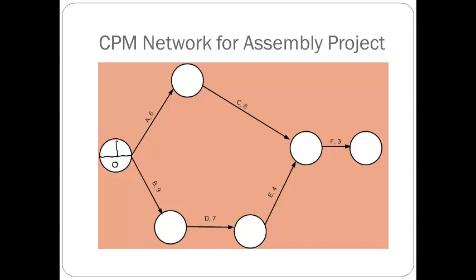And we said on all the events we're going to put the earliest start time, event start time and event finish time there. Okay, so the event start time is 0, because that's the starting event. Okay, then we'll go this way first. When we go this way, we'll put the earliest starting time. So this is the early starting time for A. The earliest starting time for A is 0. Then you put it under it here. Then it takes 6 time units to finish A, so the earliest finish time for A is 6. We put it under this arrow at the end.